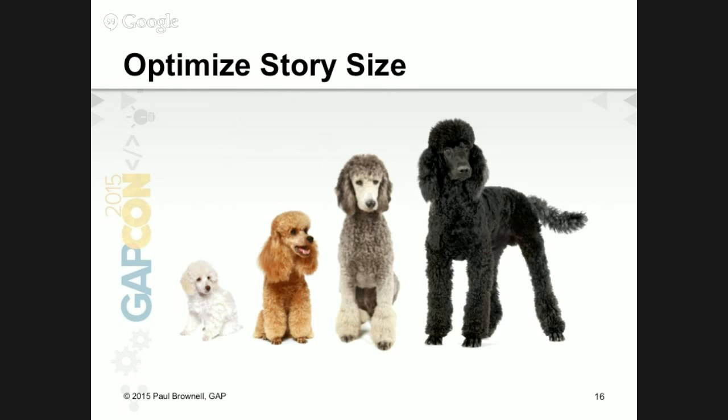So if you have to hit that risk cut line, that the effort has gone into stories that are above the cut line. If effort has gone into stories that are below the cut line and you have to go to plan B, you're throwing away work. You're having to cut away things that were affected and already done.